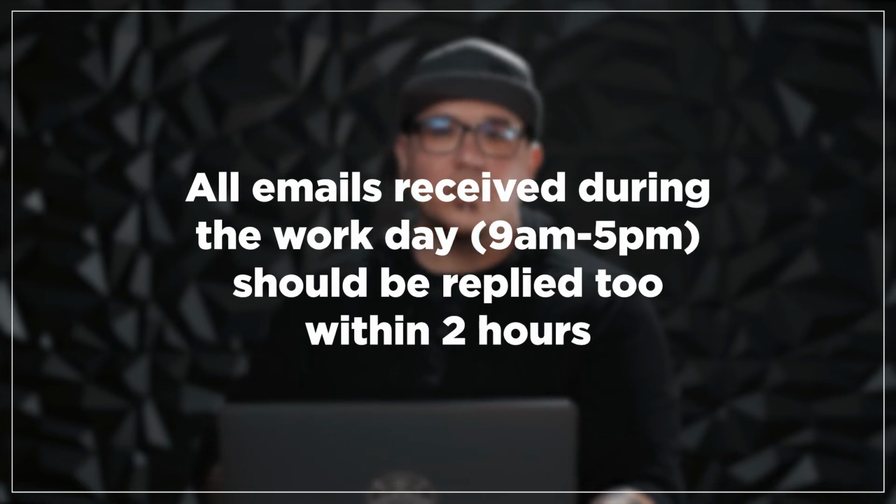And so with that being said, we have some standard tools of communication. So our team must be communicated through Asana as well as email, and our client interactions should always have an email follow-up. So if you're speaking with a client and you come to some sort of agreement, or you are needing to maybe pivot, always make sure that you document that through an email and the client responds back with their confirmation.